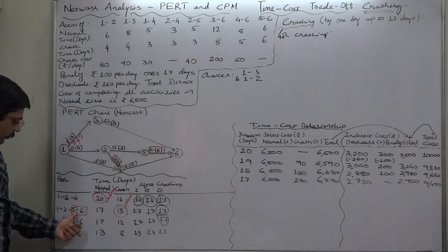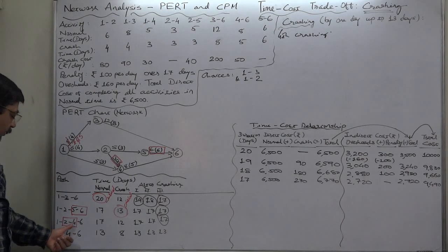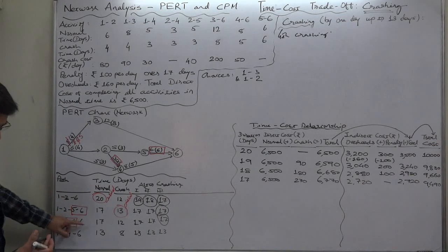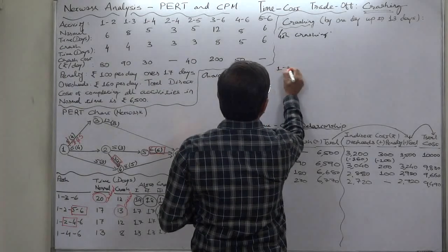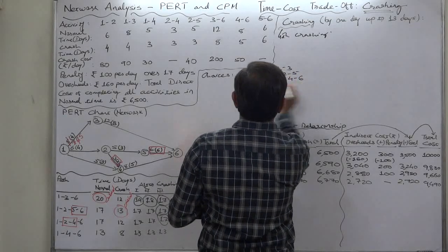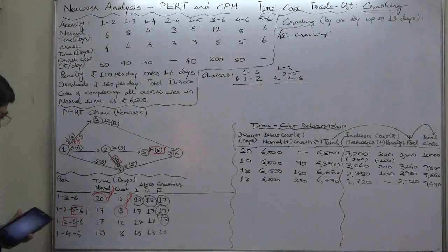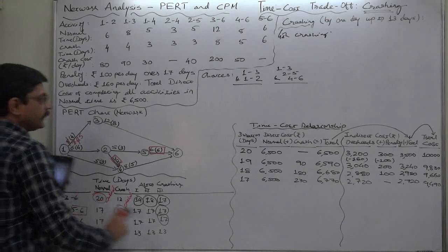Now mind well, from the second, 5-6 cannot be crashed, and from the third, 2-4 cannot be crashed. So 1-3, 2-5 and 4-6 is another choice with us. Another is 3-6 from the first and 1-2 from the second and third.